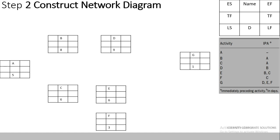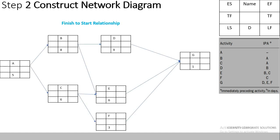You can see that Activity D is preceded by Activity B, Activity B and C are preceded by Activity A, and Activity E is preceded by both B and C. We connect these activities using finish-to-start relationships, which show the logical relationship between activities. Activity A has two successors: B and C. Activity B has two successors: D and E. Activity C has two successors: E and F. Activity G has three predecessors: D, E, and F.